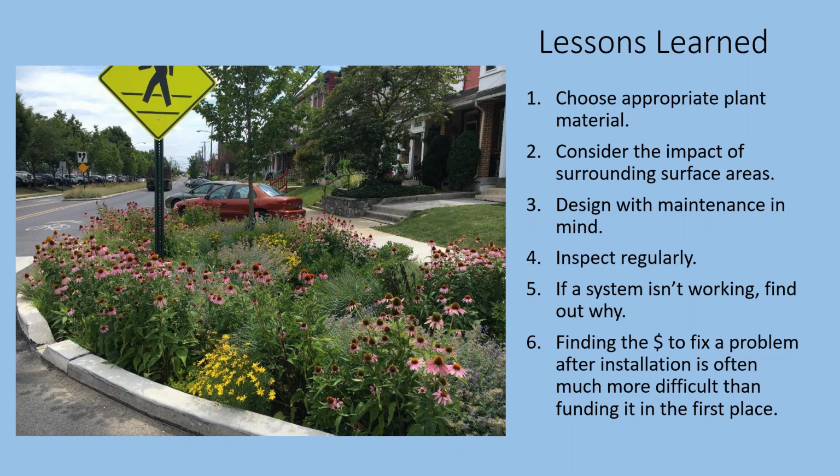To summarize, we have a very, very small staff here, despite a growing green infrastructure program. We have multiple BMPs on the ground, and we are working, like I said, with several folks to bring our asset management system up and running so that it will be compliant and consistent with those data input measures that Jane spoke of earlier, that will be an input into the BMP database, as well as some of our costs. We don't have the costs broken down just yet, but our total estimated operations and maintenance budget currently going into fiscal year 2020 is about $330,000.